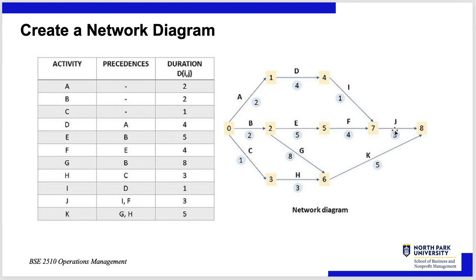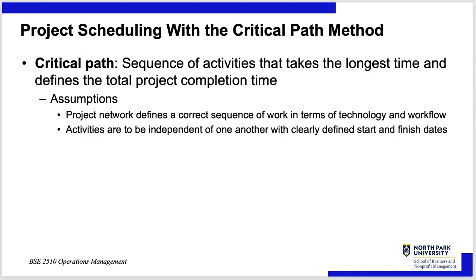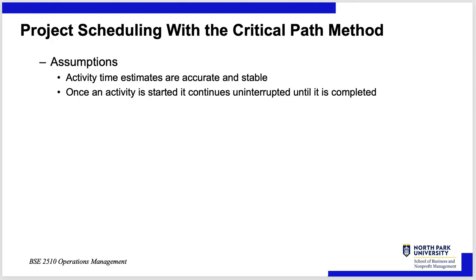You can do A, B, and C simultaneously — maybe that whole part takes two weeks instead of five. So instead of 38 weeks total, we subtract the overlap and get something less. The assumptions for the critical path method are: the project network defines a correct sequence of work in terms of technology and workflow; activities are independent from one another with clearly defined start and finish dates; and activity time estimates are accurate and stable — for the purposes of the analysis. As the project unfolds and estimates prove inaccurate, you revise them through an approval process.